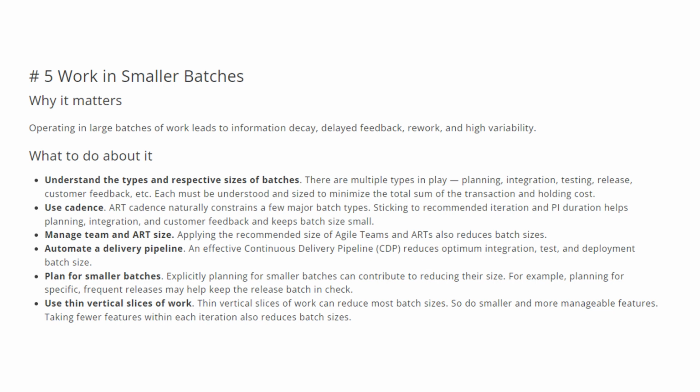Manage team and ART size. Applying the recommended size of agile teams and ARTs also reduces the batch size. Automate a delivery pipeline. An effective continuous delivery pipeline reduces integration, test, and deployment batch size. Plan for smaller batches. Explicitly planning for small batches can contribute to reducing their size. For example, planning for specific frequent releases may help keep the release batch in check.